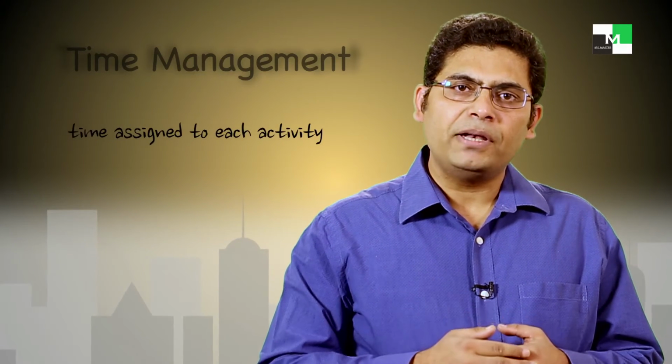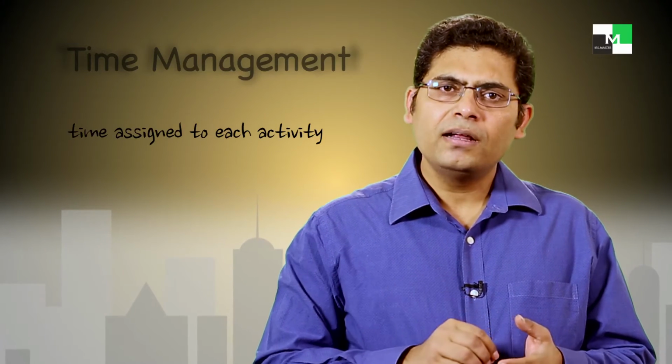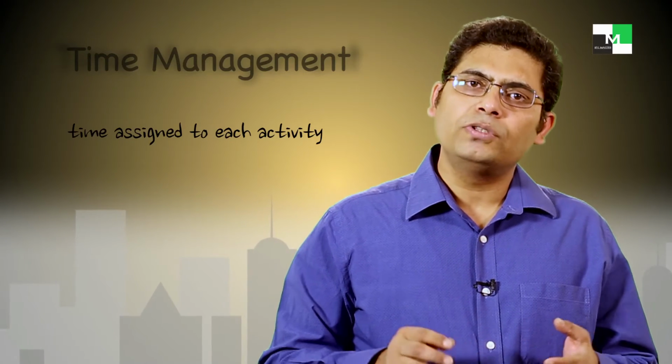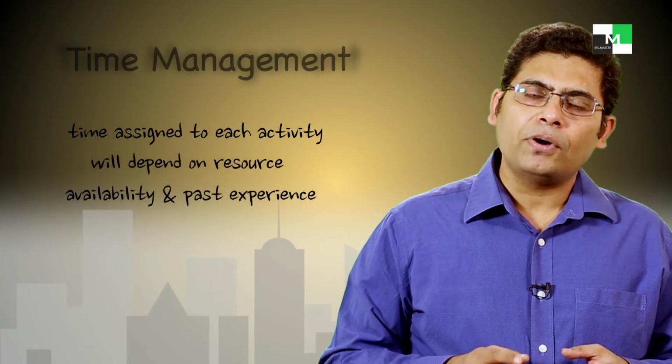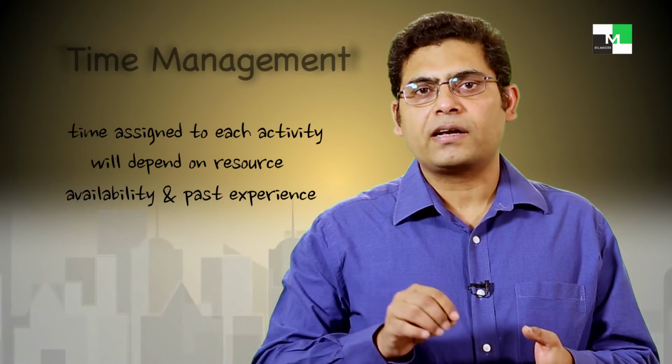Similarly, the third one you can think of is project time management. From the breakdown structure that we have made in scope management, we will know the activities. Once the activities have been decided, we first have to assign time to each of the activities. How much time we can assign to these activities will depend upon the resources that we are going to employ in those activities.